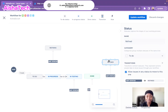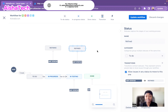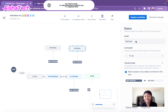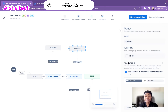I've now created another status: I have 'Refining' and 'Refined,' both under the to-do category, because these are all prep steps before a ticket meets the definition of ready. Currently both say 'any status' for transitions, but I'd like to change that. Tickets in Refining should move specifically to Refined. To do that, I'll add a transition by hitting the plus sign.